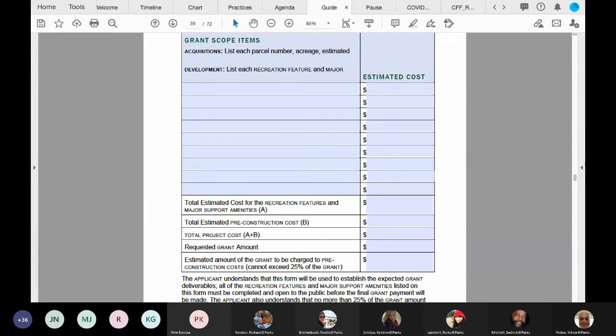We understand that costs can change during the course of the project. Applicants may build a contingency into the cost, but please do not list contingency costs as a separate line item. Limit the project to what can be completed and open to the public no later than March of 2025. In addition, do not include costs for future phases.